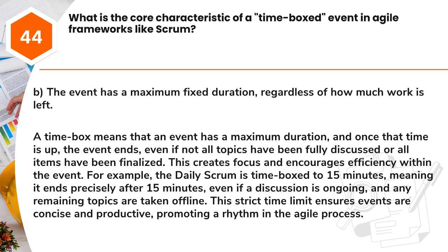Answer: B. The event has a maximum fixed duration, regardless of how much work is left. A time box means that an event has a maximum duration, and once that time is up, the event ends, even if not all topics have been fully discussed or all items have been finalized. This creates focus and encourages efficiency within the event.